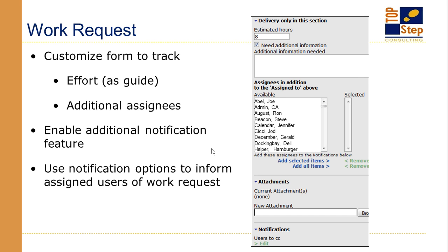And then the last item, or there's a couple other items that we had worked with customers on. One was something called a contract tracker. So they basically turn the issue form into a way to track individual contract items related to the project. And so we added a lot of custom fields to track standard bill rate, what are the terms of the contract, what kind of contract is it: change order, is it an MSA, is it a PO, that kind of thing. When does it expire? So that you could run reports to say, give me everything that's expired.